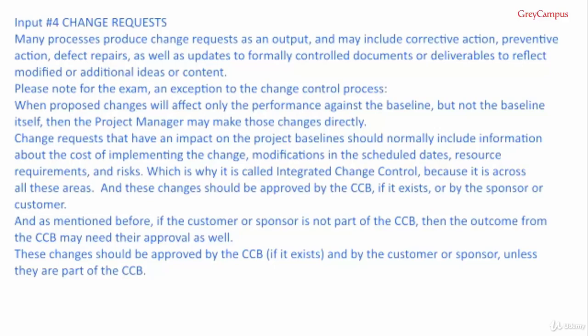Change requests that have an impact on the schedule baseline should normally include information about the cost of implementing the change, modifications in the schedule dates, resource requirements and risks, which is why it's called integrated change control, because it is across all these areas.